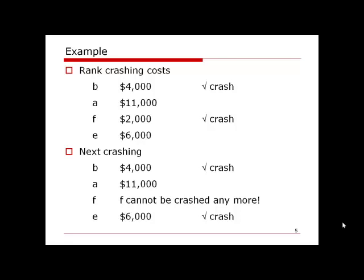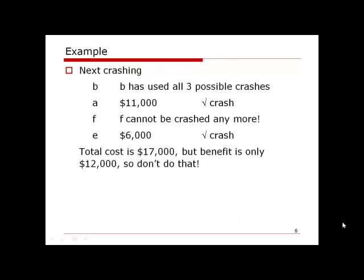For the next potential crash, B has now used all three of its possible crashing weeks, so we would need to crash A at $11,000. Combined with E at $6,000, the total crashing cost would be $17,000. Since the benefit is only $12,000 per week saved, it is not financially worthwhile — we would spend more than we save, so we stop crashing.